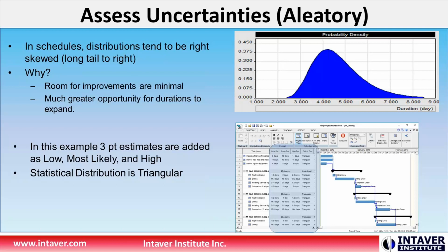There is some discussion about which ones you should use, but from our own analysis, and we do have some material up on our site and on our YouTube channels, the reality is, especially within one standard deviation, there's not a lot of difference between the different statistical distributions. So in this case, we call the triangular good enough, unless you can prove otherwise.